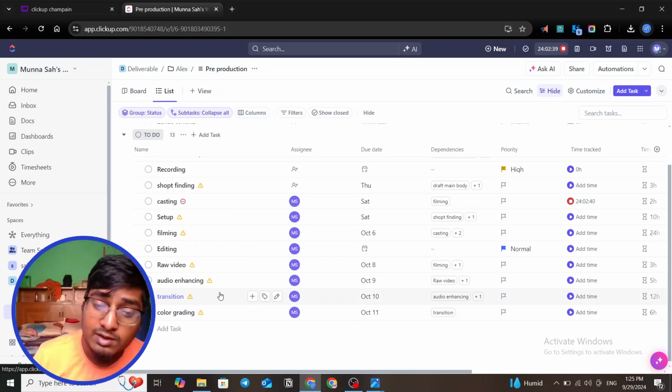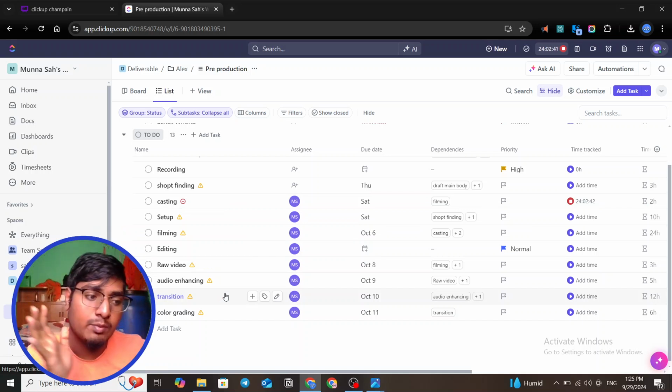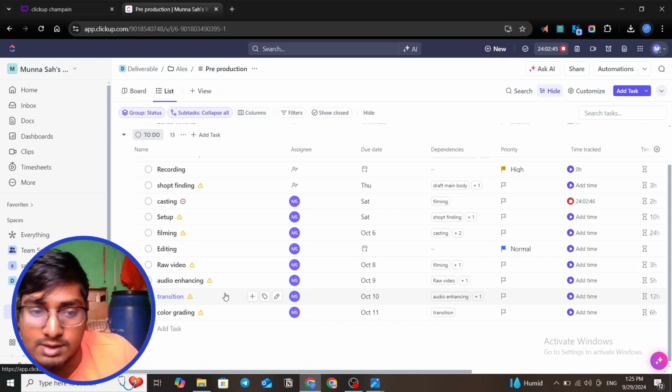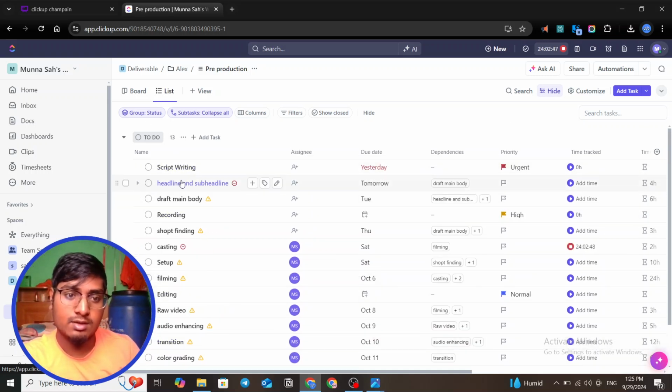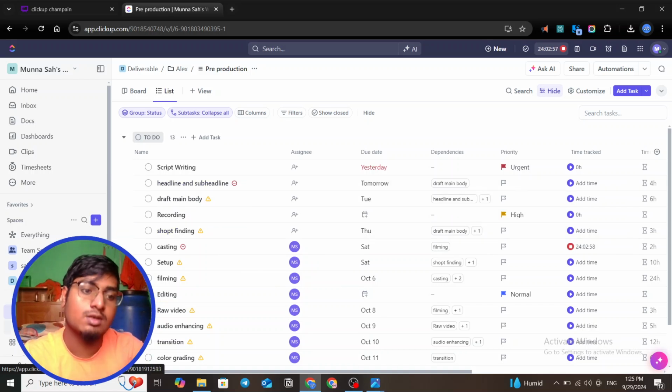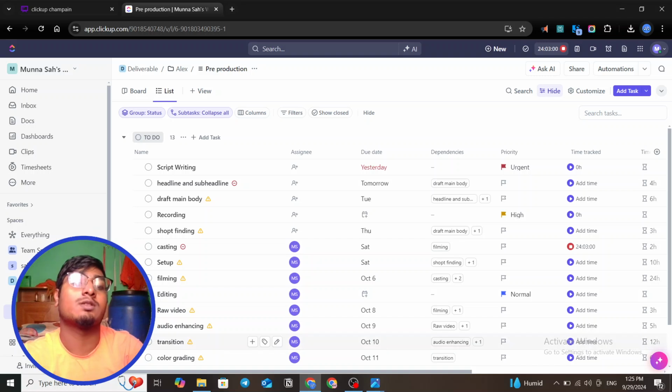If it's a one-month project, you know that in the beginning there is scripting. Now suppose that we have a reel production agency. An example is that we have scripting, headlining, drafting, recording. So this takes one week. We just define the different lists in here: pre-production, filming, and post-production.